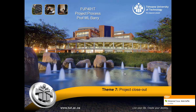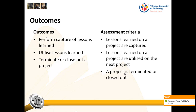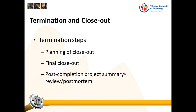Good day, students. Welcome to Theme 7: Project Closeout. The outcomes of this lecture are that at the end you need to be able to perform the capture of lessons learned, know how to utilize lessons learned, and know how to terminate or close out a project. The steps of termination are: first you plan for closeout, then you have your final closeout, and then you have your post-completion project summary review or post-mortem.